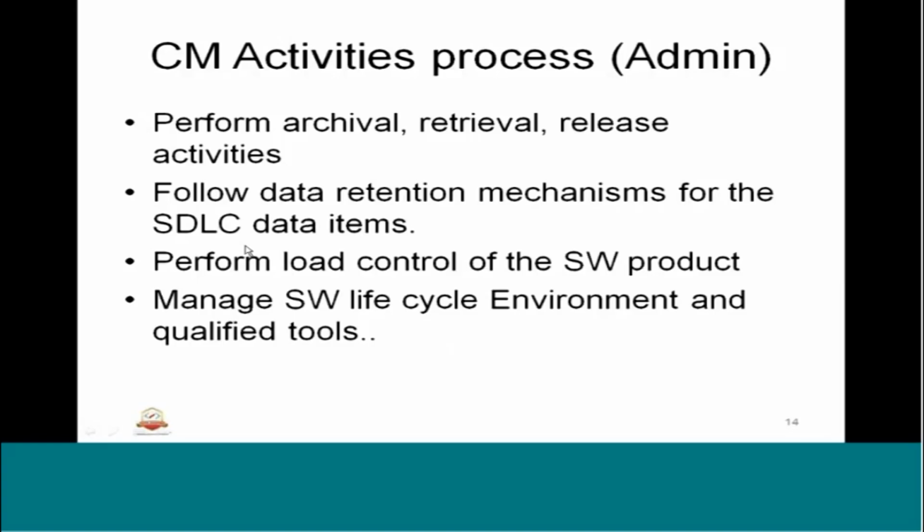As I said, retention is an important thing. We need to retain the project lifecycle artifacts till the term or the guarantee, or as long as the project is maintained in the organization in relation to the customer. He also performs load control of the software product, and manages the software lifecycle environment and qualified tools. That is also part of the admin's CM activities.